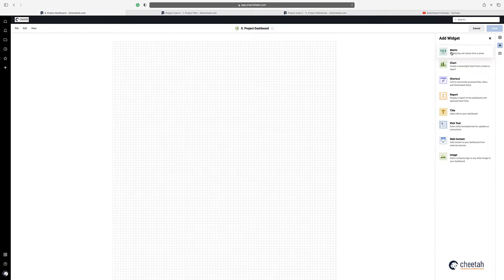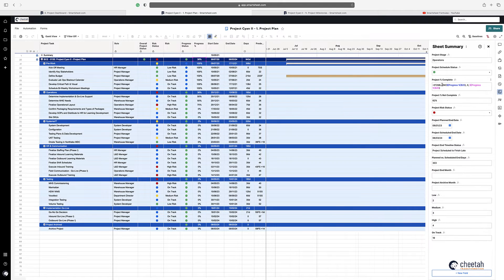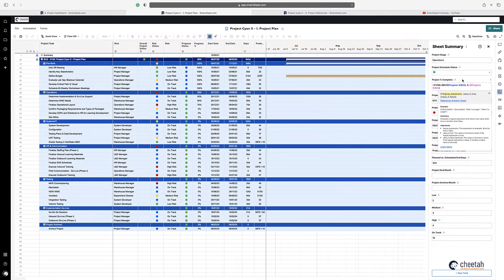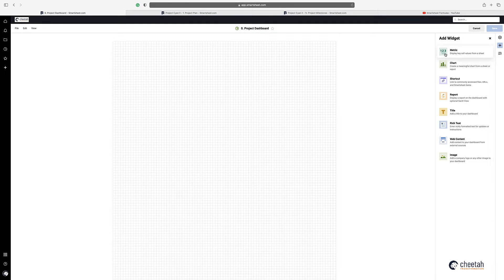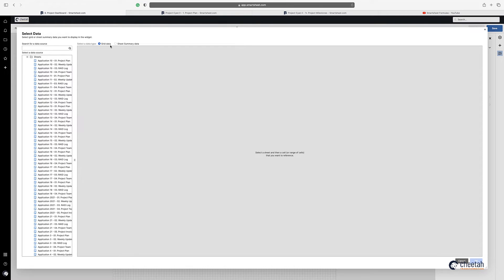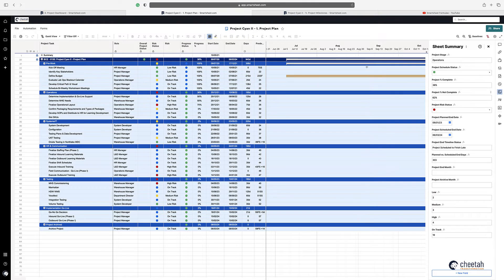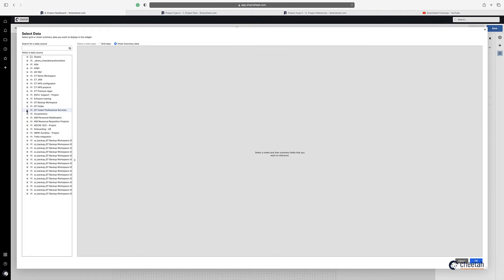The first one I'm going to show you is the metric widget. In my project plan you can see that my progress is overall at 38%, and I actually have a formula here to give me that number. So what I want to do is click on the metric, say add data, and the important thing here is I'm getting it from the sheet summary. I click on sheet summary and then locate my sheet.